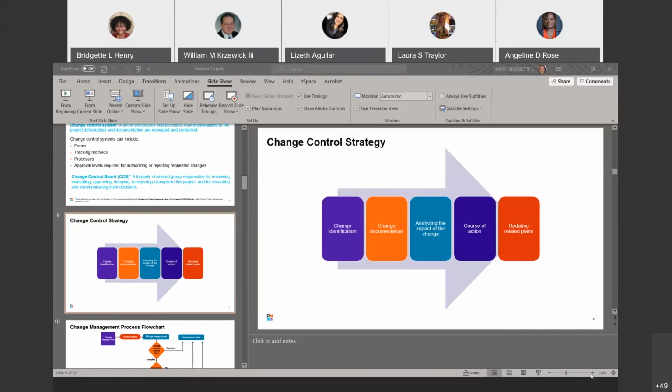The next thing: next week's scheduled building inspection. Is that an issue? It's not a risk or an issue, right? No, because of the keyword scheduled. It was already scheduled to occur in the future.